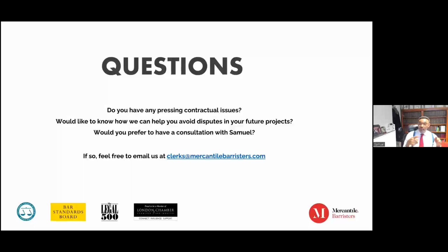So for you, I would check and ensure that the opening is actually there and ready. If, say, 30% of it is there and ready, I'll come to site, I'll fit that 30%, but then you need to notify the contractor: this is now a 2 or 3 or 4 visits job rather than the 1 visit that we quoted for. Now, it doesn't mean that you're asking for extra money. You are stating the obvious, stating the facts, such that it is on record, because it's often the case that subsequently, when the principal contractor is blamed for not finishing in time, he turns around and blames you for not finishing in time.